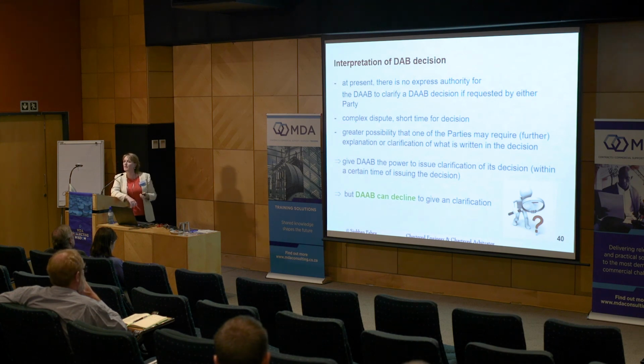If the DAB thinks you're messing around and asking for an interpretation, they can decline to give one, because unfortunately parties sometimes use that as a way of trying to get a different answer to their question before they go off to arbitration.